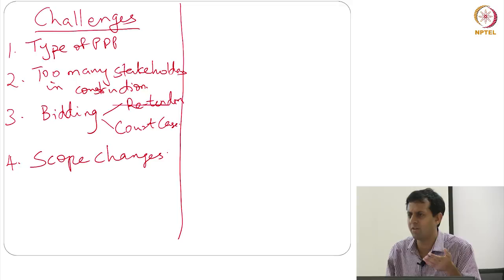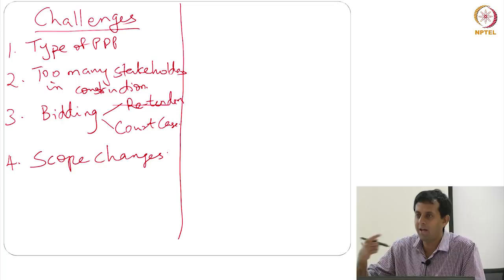This is not fair procurement. You're bringing these guys in at one price point, telling them to do something, and then you're just artificially increasing this. Now, had you bid originally with two runways and an air traffic control tower and UDF, how do you know that you might not have gotten somebody else with a much more competitive bid? So the scope changes spiral into a number of discussions.